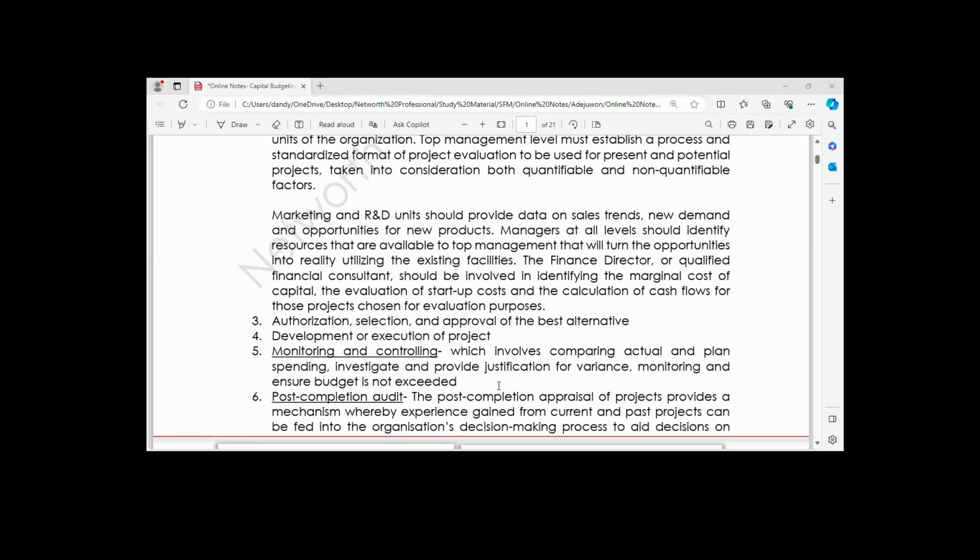Not only that, certainly there will be variance, because this is also where you have responsibility as an accounting person in your own department. So you need to monitor the actual spend versus what you have budgeted. If you're about to go above your budget, you need to inform the management on a regular basis, especially monthly. You need to go back to the management and explain the project status, so that you tell them the trend of project spend.